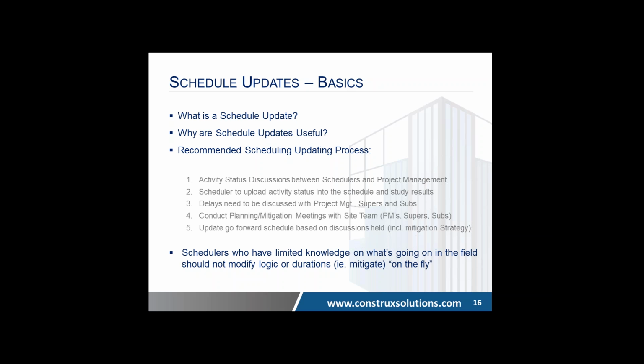And as a matter of fact, next week we have a presentation on data management in construction where I will talk to people about how to do this process. It's about looking at your daily reports, taking out very relevant information, overlaying it on your original plan, and then producing accurate assessments of what's being impacted, why it is happening, and what it's going to do to the future of this job if things keep continuing, and then ultimately preparing strategies around that.